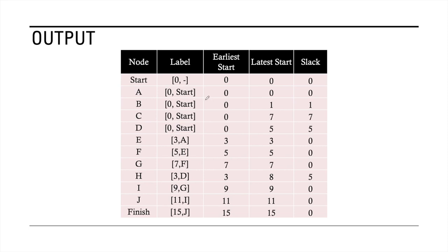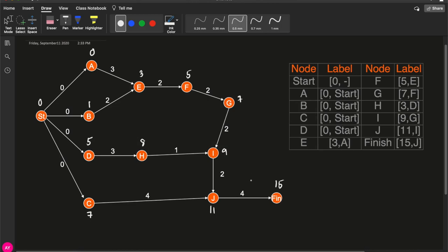So again, we have the labels, and the longest path duration is also the earliest start time. We've determined the latest start time. And once you already have your LS and ES, you can actually subtract ES from LS to be able to get slack. And I hope you notice that in your slack, there are a lot of activities with a slack of 0. And we can do that here. So again, I'll use red to show slack.